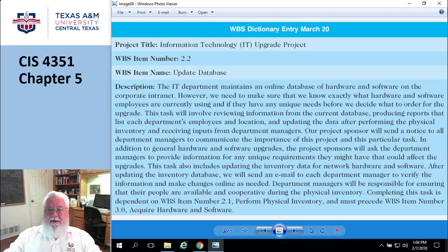One of your WBSs ought to be managing changes. Sally over there is going to do the data input, and she's going to approve changes. Okay, so her time is recorded against the project. Never should it be like other duties as assigned. Bob's a painter over here, but he's also going to be the one updating the changes in the database. No, that's not right.